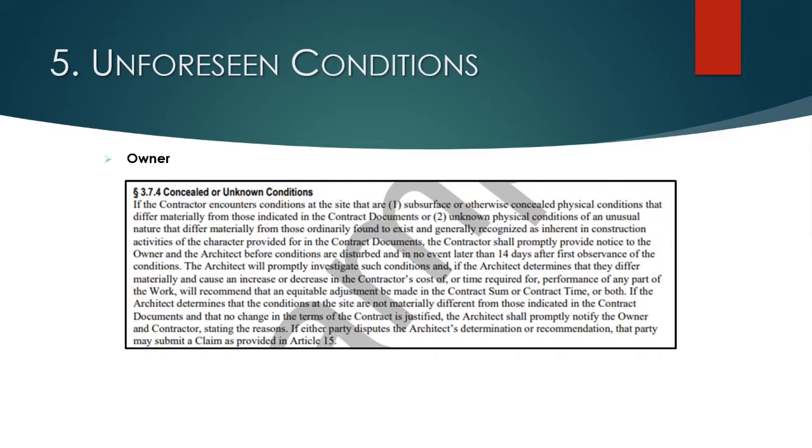And language along the lines of the subcontractor is required to perform a site investigation, and the subcontractor is not allowed to submit a claim for unforeseen conditions to the extent that could have been determined by a reasonable site inspection.